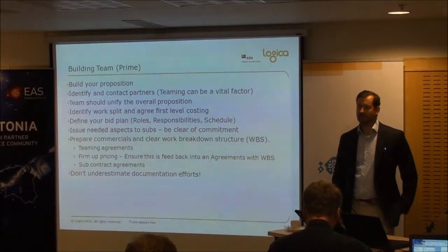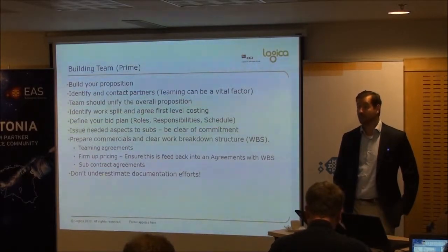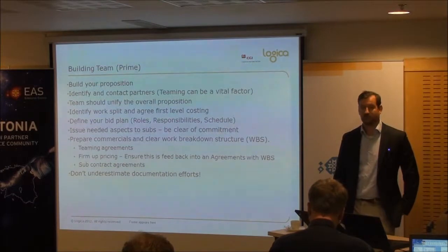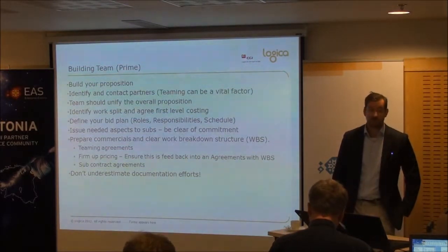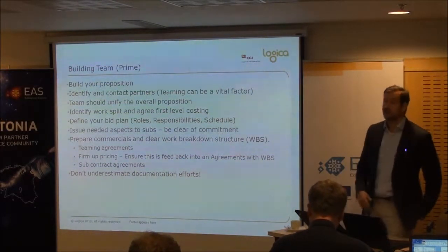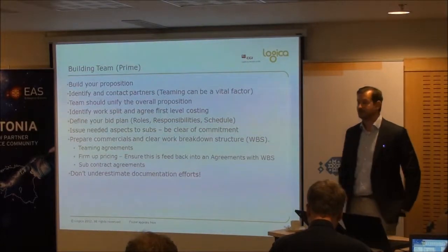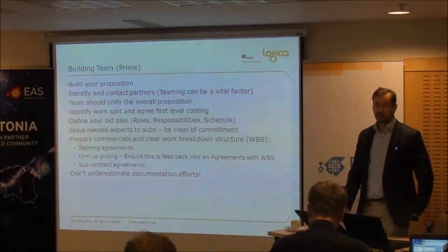Be clear of the commitments that you expect from your subcontractors if you're priming. What I mean by this is, have a very clear bid plan yourself, organise yourself, have a bid lead and responsibles for each document. They may be the same person if it's a small response. If it's a big response, don't let it be the same people. Have clear ownerships, clear responsibilities and clear deadlines.